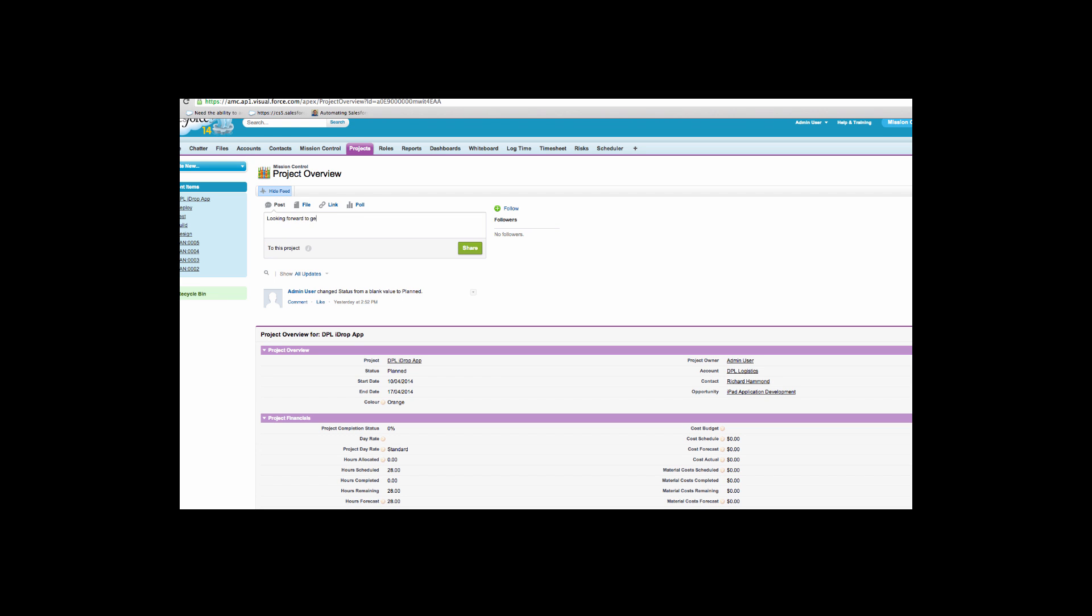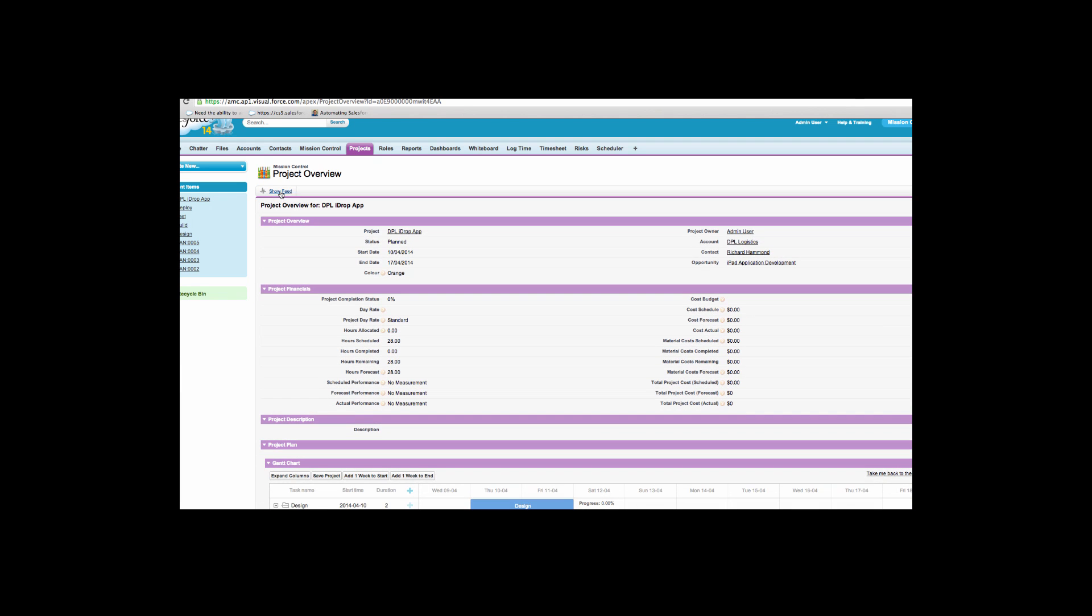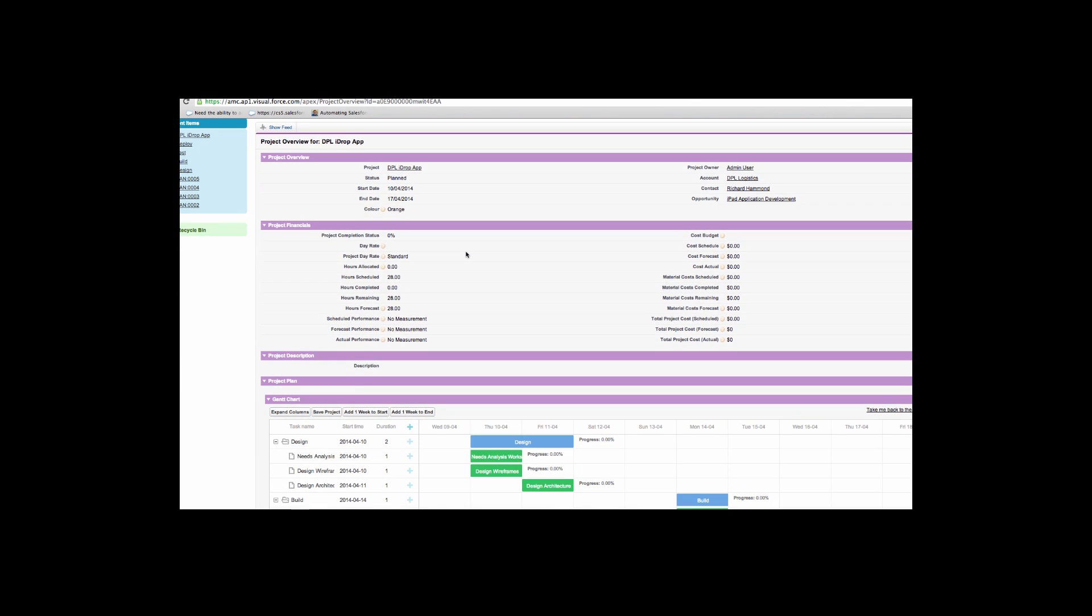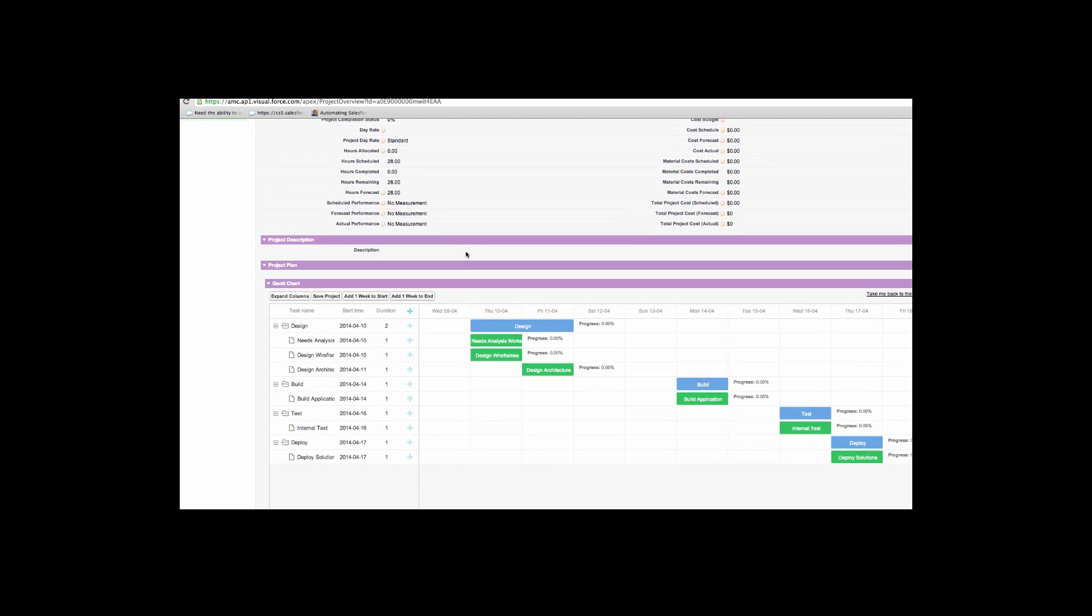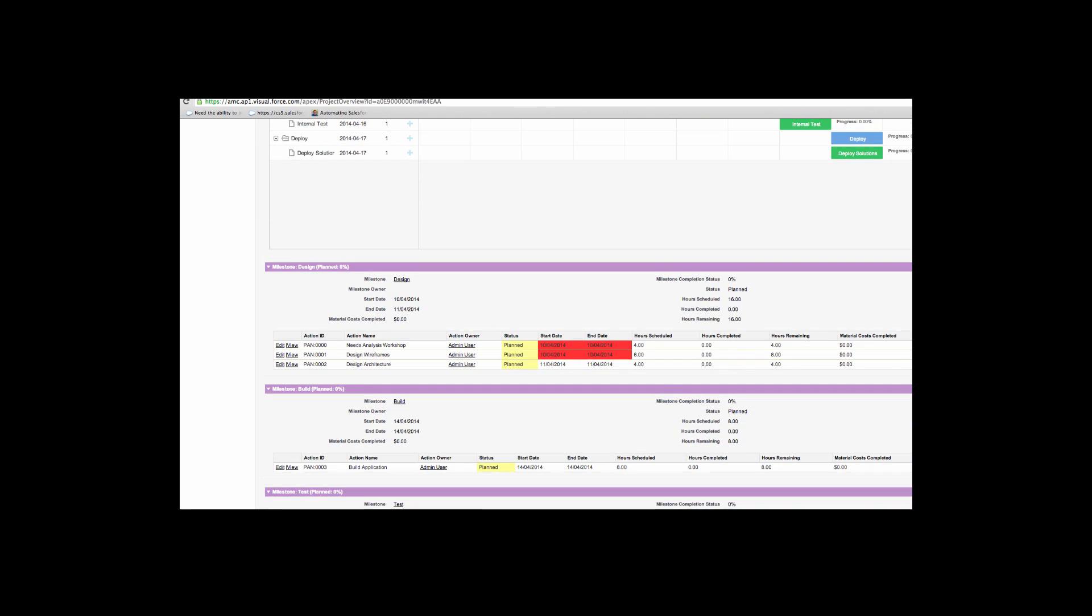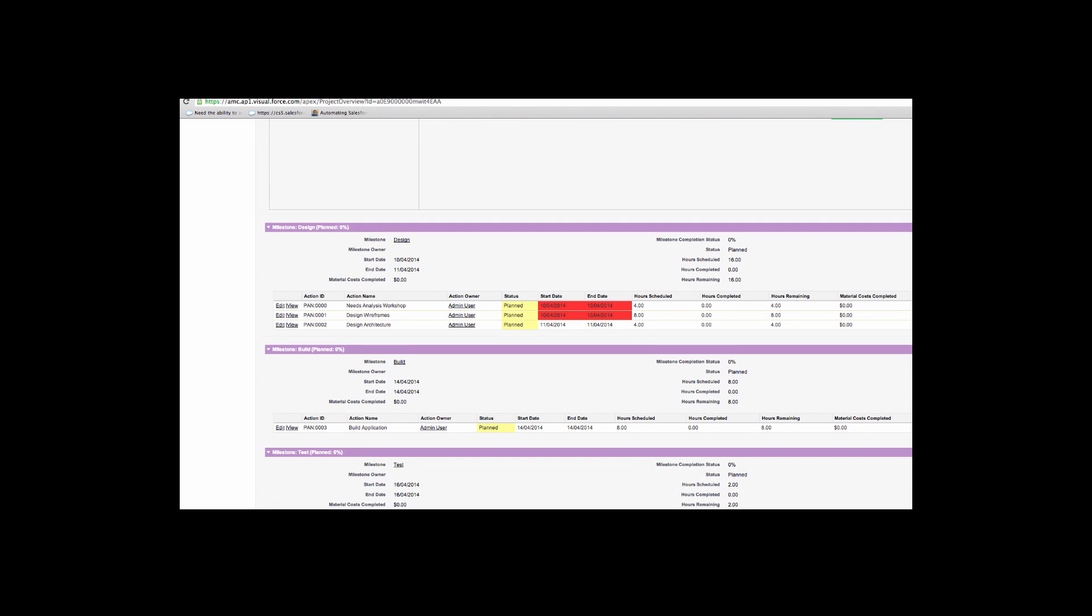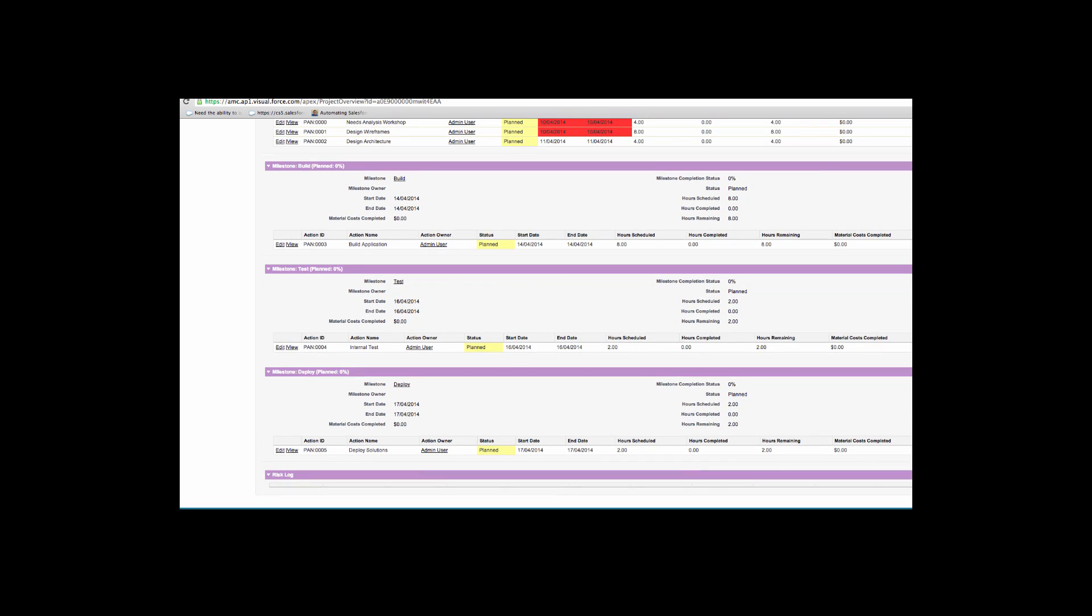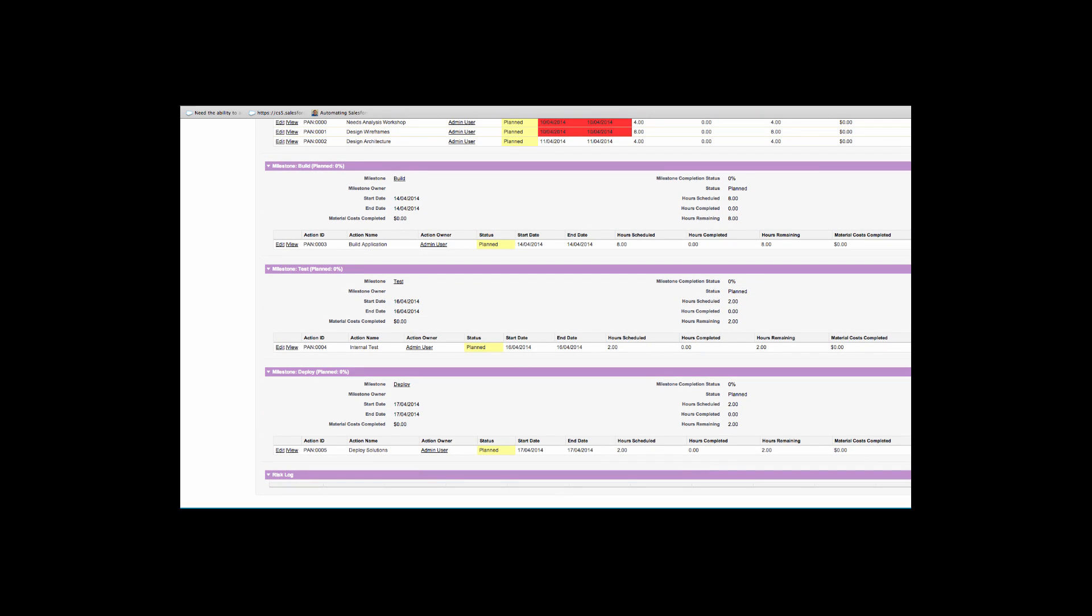The mission control application integrates fully with Chatter. The project overview page displays details relating to the project, including project completion percentages, as well as financial information such as the cost forecasts. An interactive Gantt chart shows the progress of all milestones and actions for the project. Underneath the Gantt chart, all milestones and actions are displayed. Conditional highlighting helps to identify overdue actions.